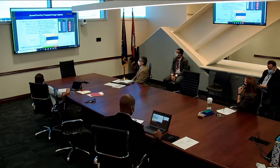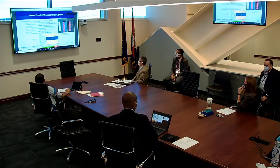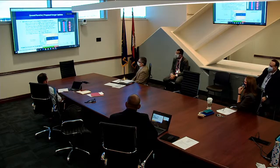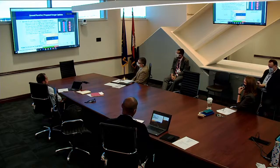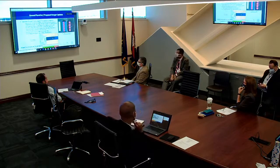And in terms of timing, the way the capital budget works is in the fall, typically somewhere around October, November, they open the window for about a month to apply, and then you don't hear anything for about a year. So as we mentioned, the 2019 grant applications we submitted last fall, we heard about a month or two ago. So the plan, once we look at everything in discussions with the state, is we'll see what we can submit for. Obviously budget dependent, because these grants are all 50-50 match. So we still have to have 50% of the project costs in hand. And as Todd alluded to, it's working through those pieces as best we can.